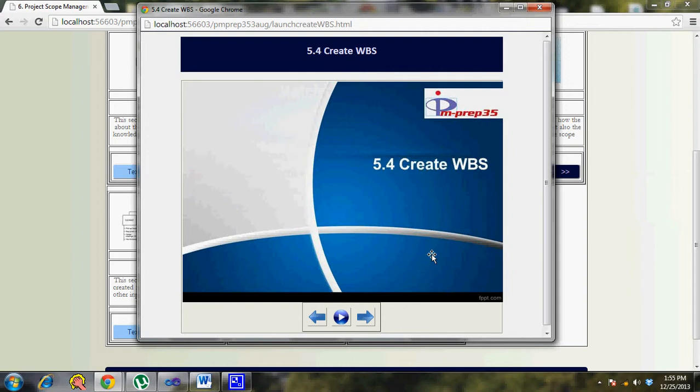It will have a description of the particular WBS item. It also will have other things like the milestone, or what kind of resources should be allocated for it. Whatever you can't put in the WBS, you write as descriptive information or attributes in the WBS dictionary.